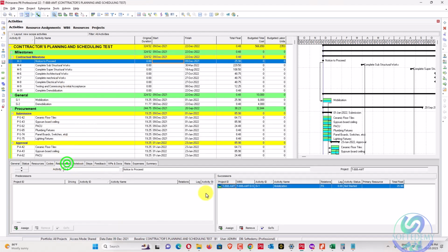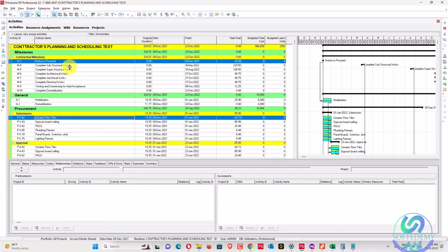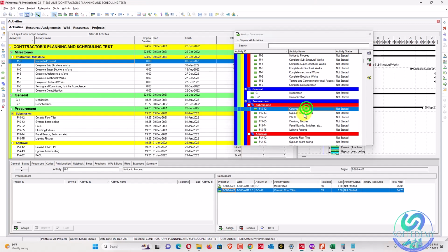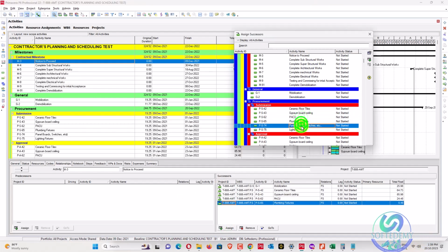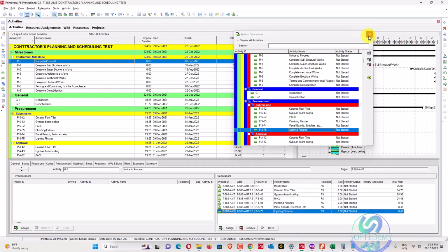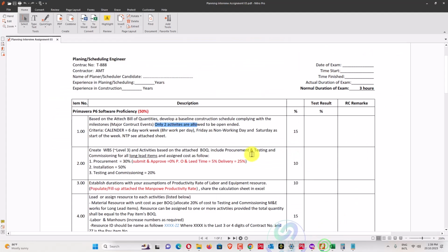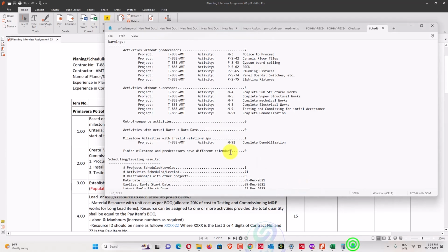We'll create a notice to proceed relationship, and now we can assign all these activities after the notice to proceed, not after demobilization or mobilization, because some people just get approval on notice to proceed also. They apply to the vendors and get approval from that. Okay, so what else do we have? Predecessors are done. What about the complete successors?